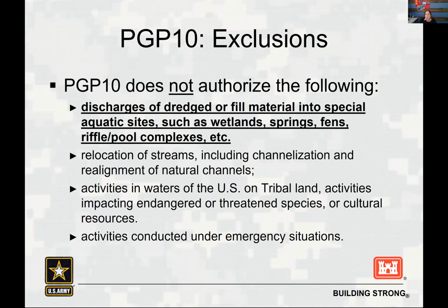So it is very important that when you're planning your project, you look at the site conditions, and if there's an impact to wetlands, that you consider that, and you notice that, hey, this is not going to qualify for a GP10. I need to go directly to the Corps and apply for a different level permit.